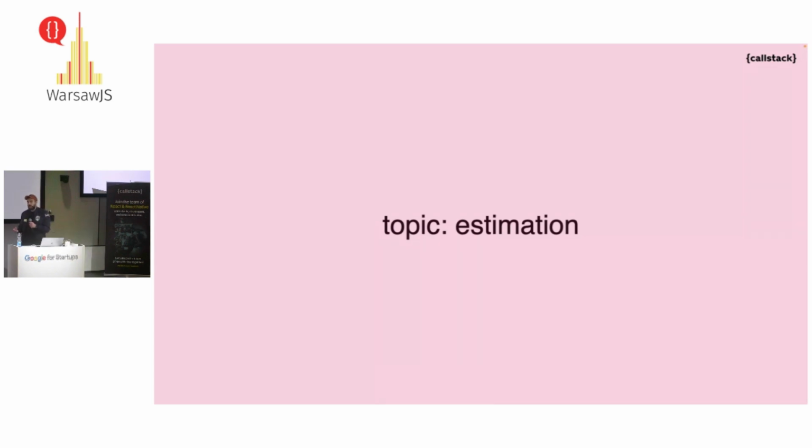Feedback kit or documentation can have some updates, so also pay attention to observing their updates and add some buffer for it. And keep in mind that some components are more complicated than others. For instance, they have more variants or modes, or the code is even more complicated. So apply the correct buffer for that.